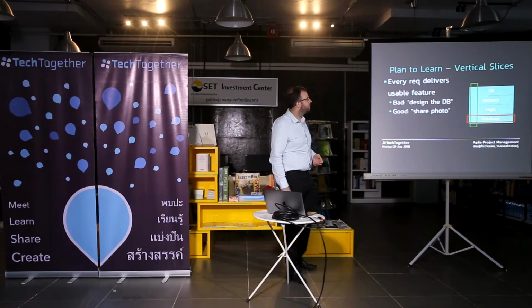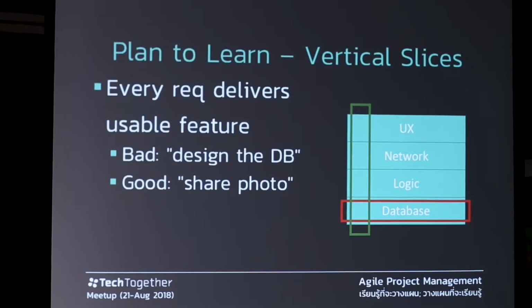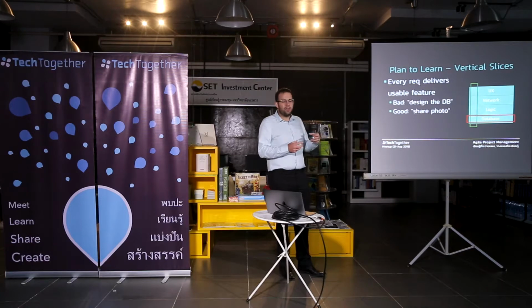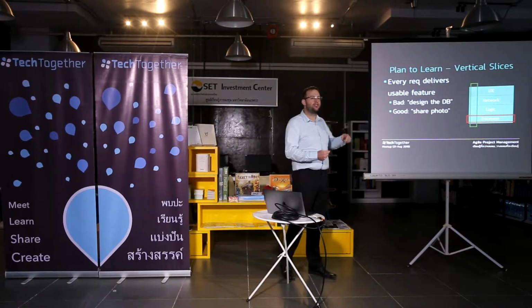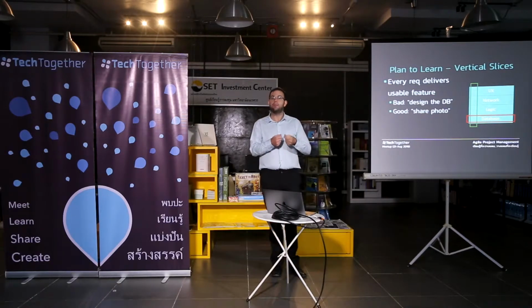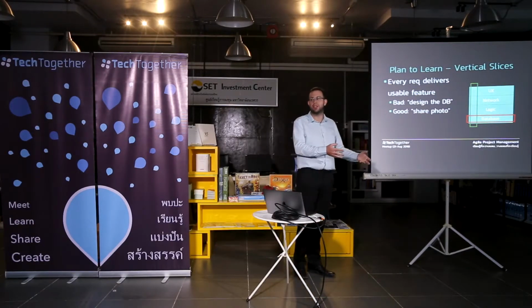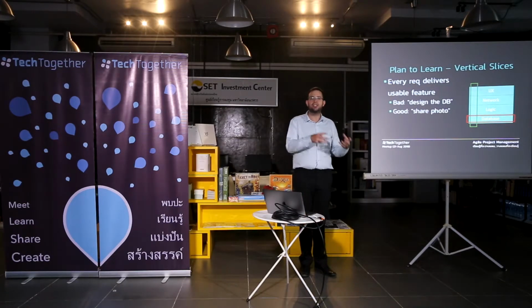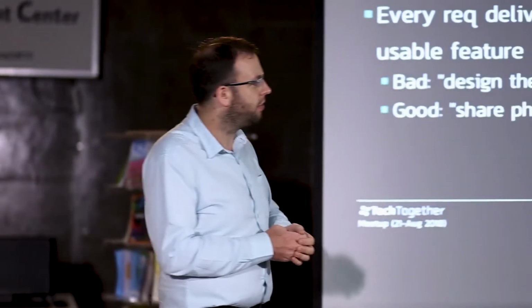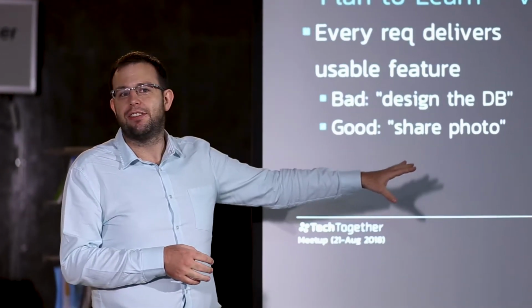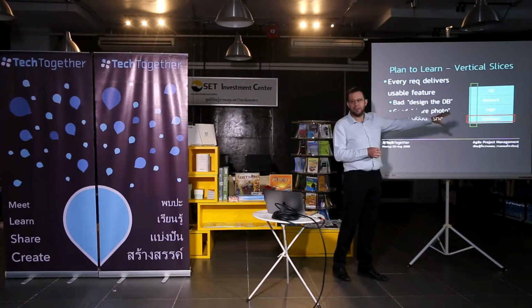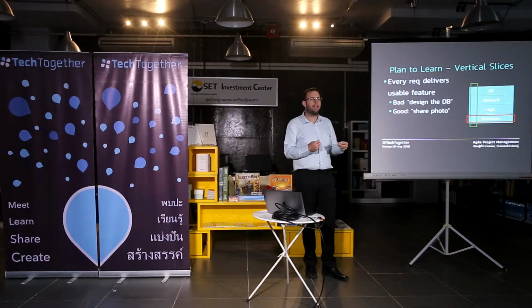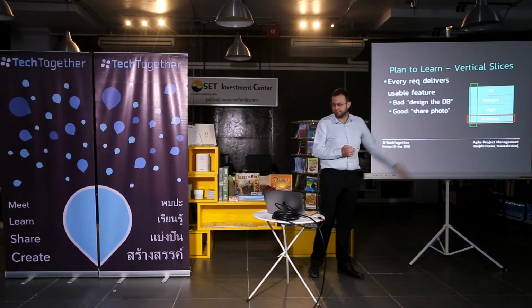So you need to discipline yourself to pick functional-based requirements. Every time that you take on a task, that task should deliver something that could then be used, that potentially you could release to a customer. And that potentially releasable idea is important, because if it's potentially releasable, it means that you can test it, you can verify it, and make sure it does the right thing. If it's not potentially releasable, it's just sat there. So anything that you've put effort into that you're not getting something back from is essentially waste.